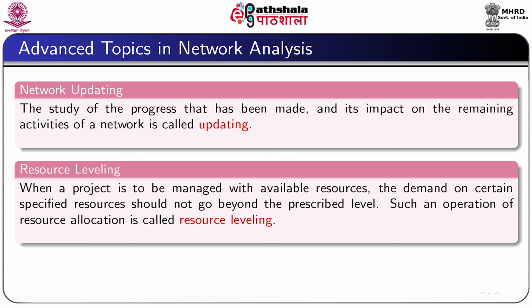The time estimates made before may be incorrect. A particular activity may take less or more time. So, by modifying estimates of time on various activities, the remaining network can be redrawn. This is known as network updating.